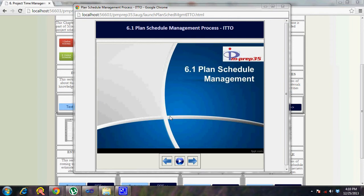This is the process where the methodologies and how to deal with the different processes in this knowledge area are detailed. Like any other planning process, the project management plan gets first documented with less information initially, but as planning moves on the project manager pulls subsidiary plans into their own documentation. What starts as a one-liner becomes a detailed schedule management plan.